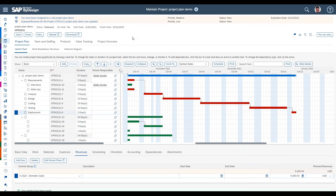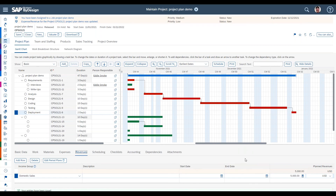With expenses and revenues set up, one last thing to demonstrate: after the project is running you may need to update those planned values. You can certainly update them directly in the tabs. However, if you have many rows — broken out by multiple date ranges — there's a more efficient alternative: you can use Microsoft Excel to download the planned expenses and revenues and upload the updates back into the system.